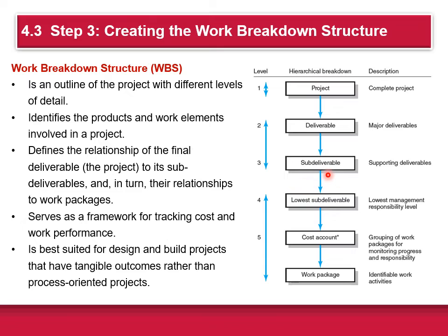You can have multiple sub-deliverables, and even they can be broken down into smaller pieces called sub-deliverables. And finally, it gets down to a point where you have what's called work packages, and these work packages typically are for individual people to work on. So these, for example, like design and testing.